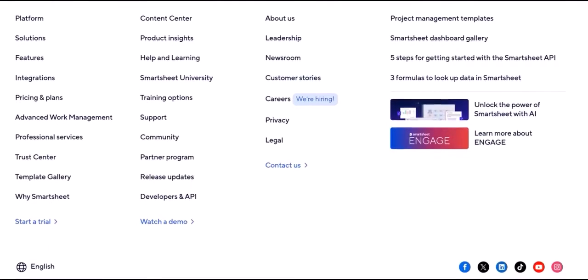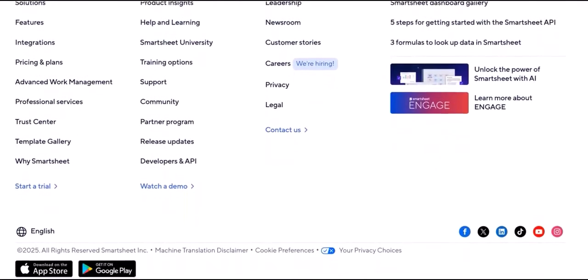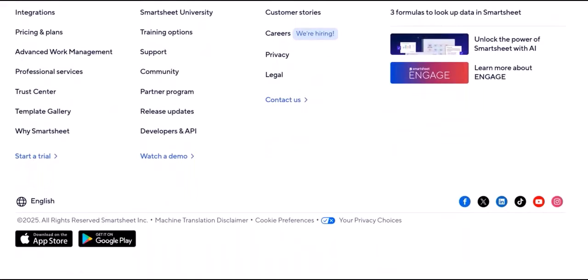Calendar view, conditional formatting/formulas. This is the hardest to truly replicate dynamically. You can create a simple calendar layout using dates across the top. Use IF statements and conditional formatting to highlight cells on the calendar based on task start/end dates. This would be more for visual reference than interactive scheduling.